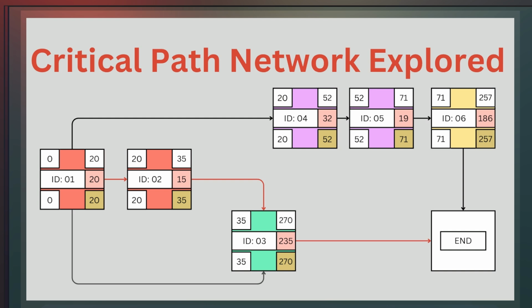If slack exists, you might reallocate resources or accelerate certain tasks to optimize efficiency. For example, if a task involves another department but they need to focus on another priority, you could allocate additional members from your own department to finish the task quicker, made possible by the slack identified in CPM analysis.